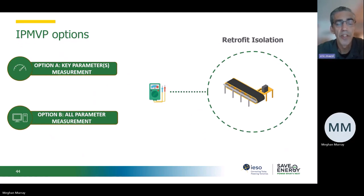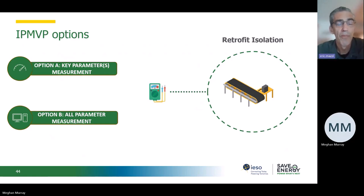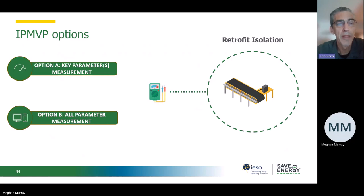With the IPMVP, the options are literally A, B, C, or D. When I started doing M&V about ten years ago, it was like another language — people say 'I did an option A' or 'I did an option C' and assume you know what they mean. Options A and B are retrofit isolation methods. Option A is where you consider all critical parameters and measure some of the key ones. Option B is more robust, more accurate, and more costly — you isolate the system as far as the measurement boundary, and the M&V professional identifies all critical parameters and measures all of them.